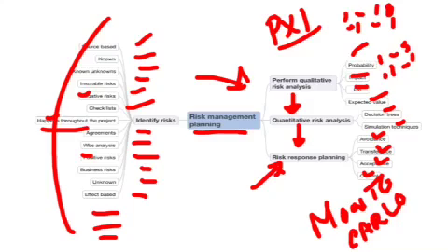So this would have given you a general idea of the workflow of planned risk management process. The first thing is you come out with a risk register. The key thing about risk register is it contains all probable risk, and it is not a one-time activity. It continues throughout the project. Then whatever is identified, it gets into qualitative risk analysis, where we associate a probability factor and an impact factor to every risk. And you categorize, you filter out by applying a threshold of P into I, which is also known as expected value or the expected monetary value of the risk.